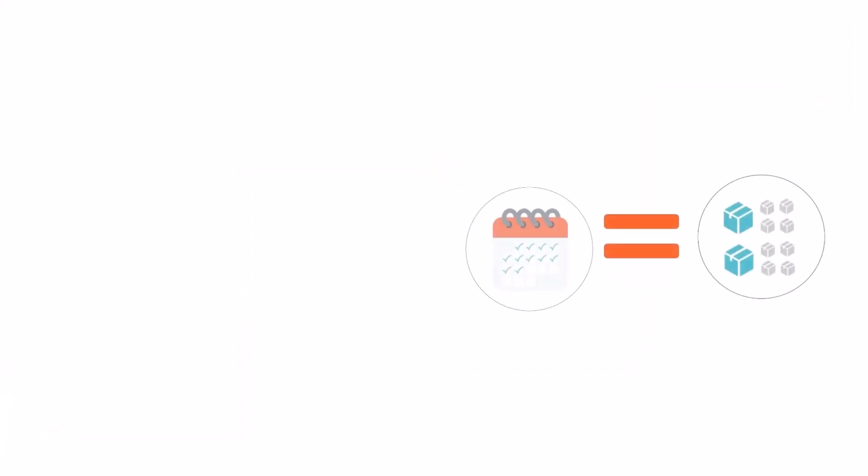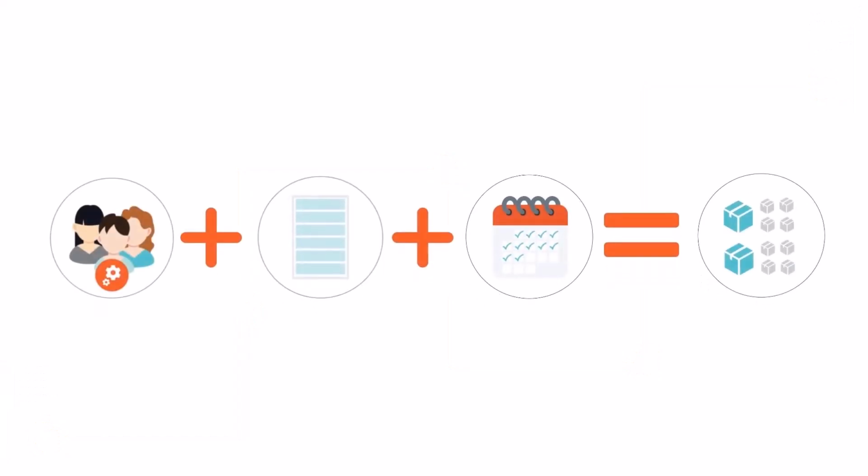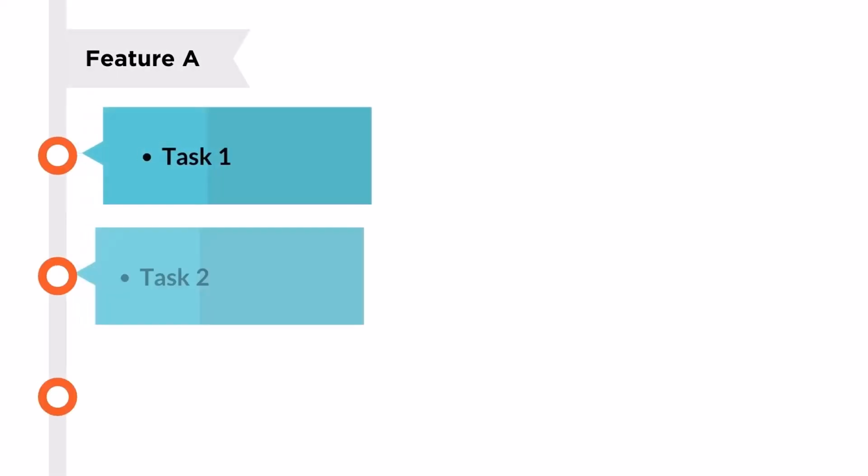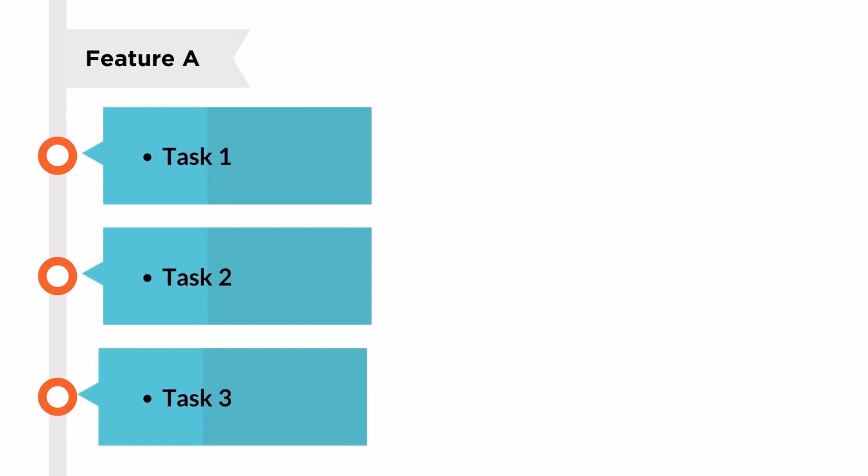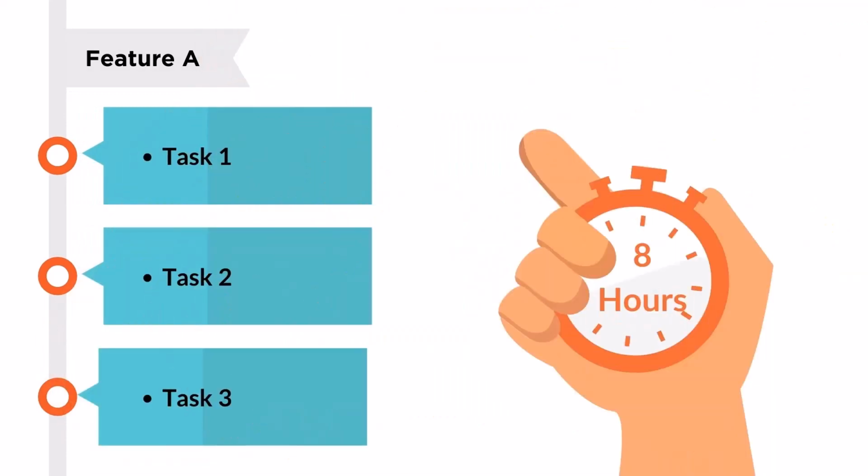To acquire confidence in what it can accomplish, the development team will create a plan for how it will achieve the sprint goal. Collectively, the selected product backlog items and the plan form the sprint backlog. Most teams then break down each targeted product backlog item into a set of estimated tasks which collectively form the plan. Teams that take this approach typically follow a helpful rule of breaking down tasks so that no one task is more than 8 hours of effort, although some might be a bit larger.